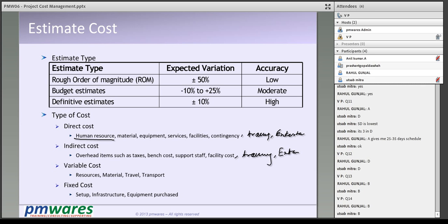Support departments are there, quality assurance is there, admin is there. All these costs we are spending to support all the projects in the organization. Therefore a factor of such cost goes to every project. Whether the project exists or not, these costs will still be incurred, and therefore all projects will share a part of such cost.